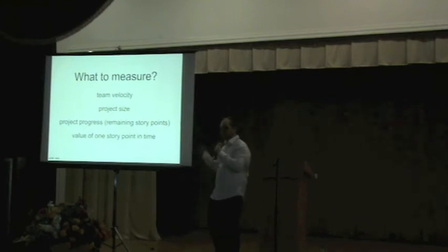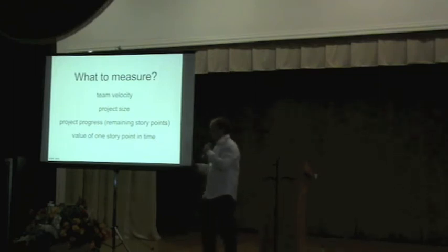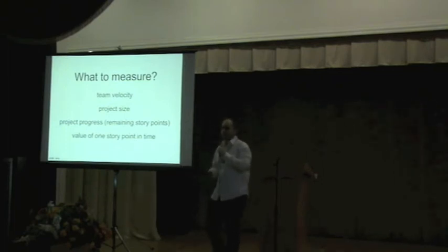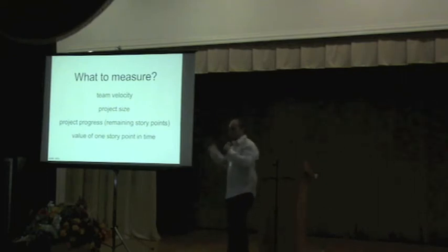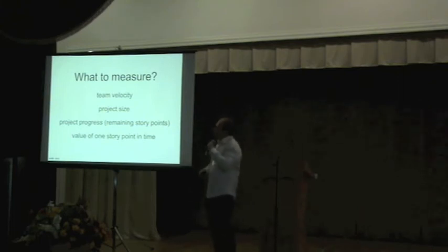For example, if your team estimated a feature at a certain number of story points, you can have a look in your time tracking system at how much time it actually took. Because sometimes there can be this symptom of so-called story point inflation. The team starts to overestimate because they failed to implement the features in the past. They start to overestimate and overestimate them, and then you end up with fewer features in the product backlog, but more estimated, and that's quite bad.